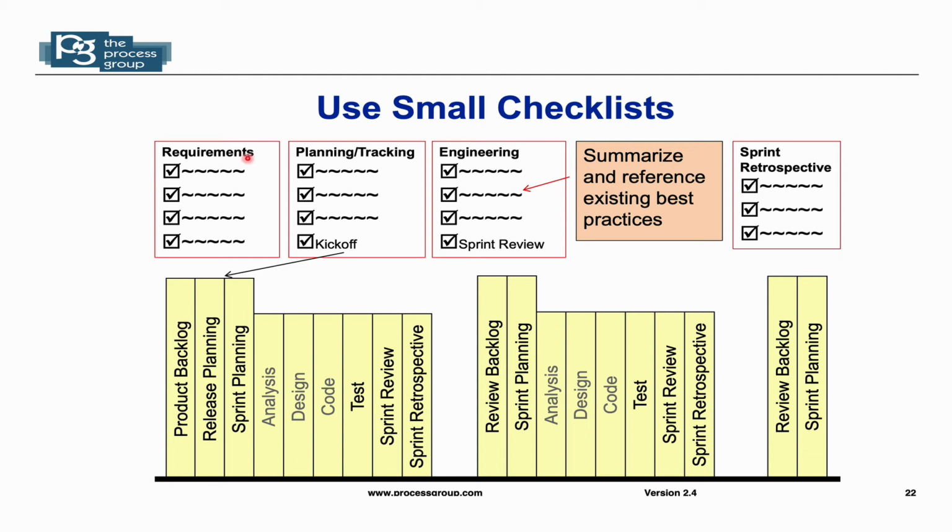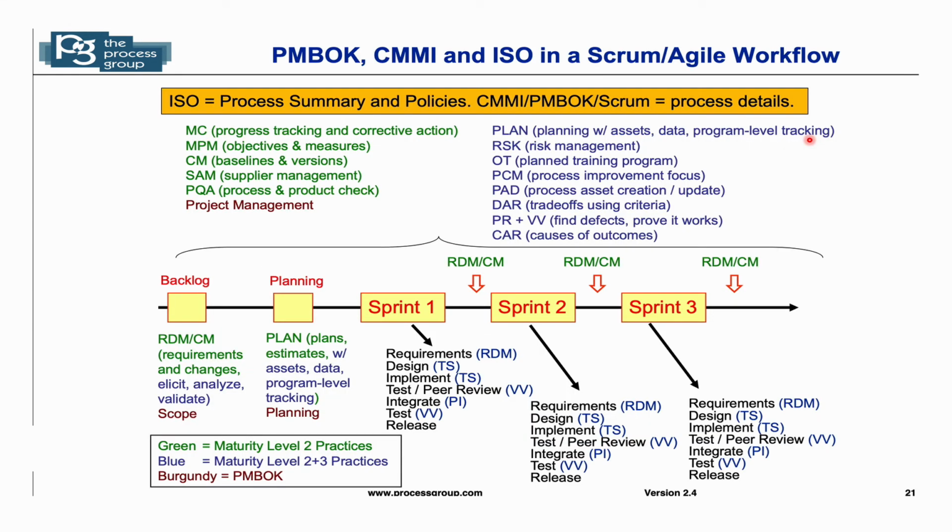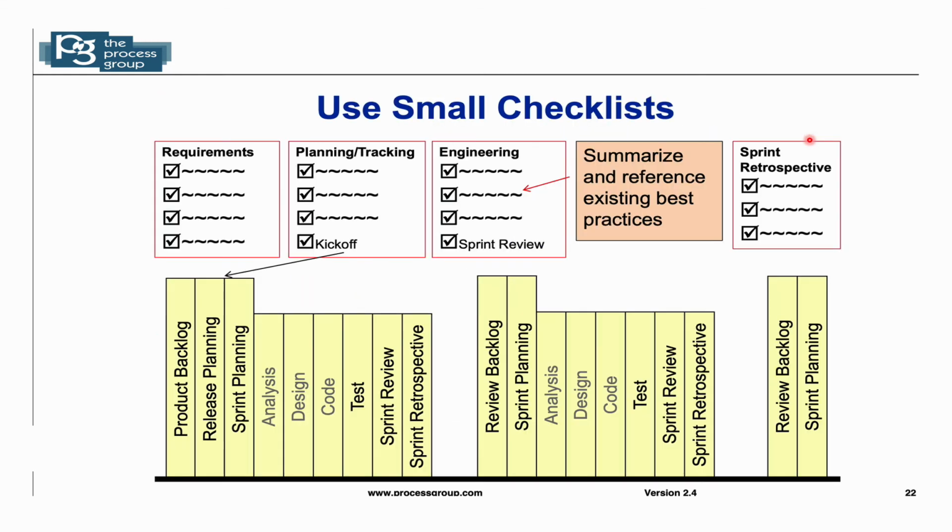If we look at planning activities, how we scope the project, estimate, track, assess risk, mitigate risk, etc., can be under the category of planning and tracking. And how we do engineering, or the iterations, all of the things you do to do design activity, architecture, interfaces, coding, peer reviews, etc., can be in a checklist style under engineering. And even retrospectives, learning to collect data, both positive and negative, and share that data across the whole organization. So this previous diagram, we could learn conceptually, they fit together very well, but to implement, we could then do it incrementally by these one-page checklists.